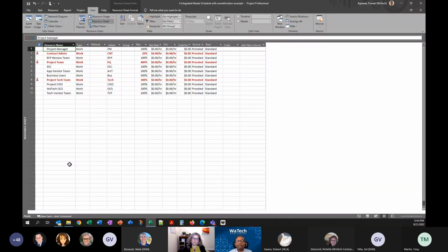So again, as a basic example level, the way I have mostly used is assigning the work more at a team level and not necessarily at an individual person level. And what it helps us is to minimize our rework when the resource changes.